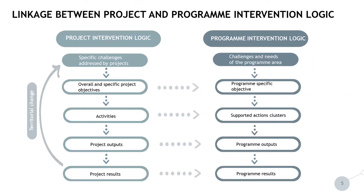On this visualization you see on the left-hand side the project intervention logic and on the right-hand side the program intervention logic. There needs to be a very clear linkage and consistency between the two. For example, the overall and project specific objectives need to clearly contribute to the program specific objective. The project activities need to be consistent with the supported actions foreseen in the program document. The project outputs need to contribute to the program outputs, and the project results need to be consistent with and contribute to the program results.